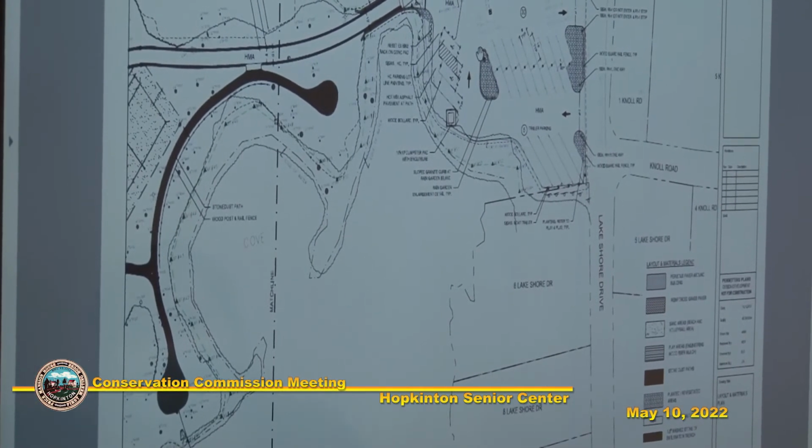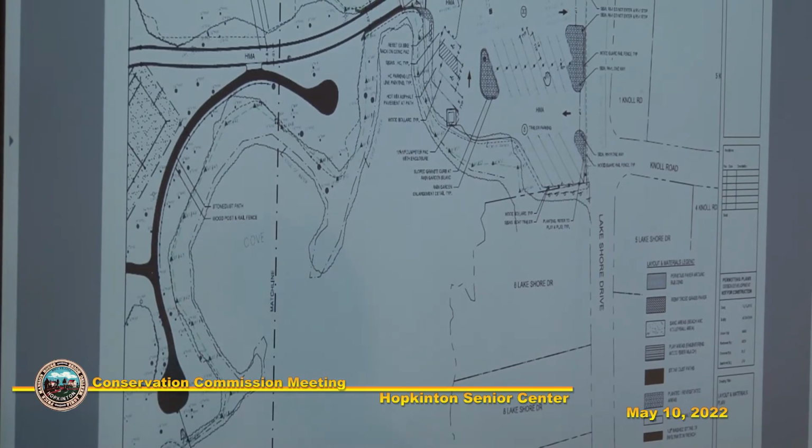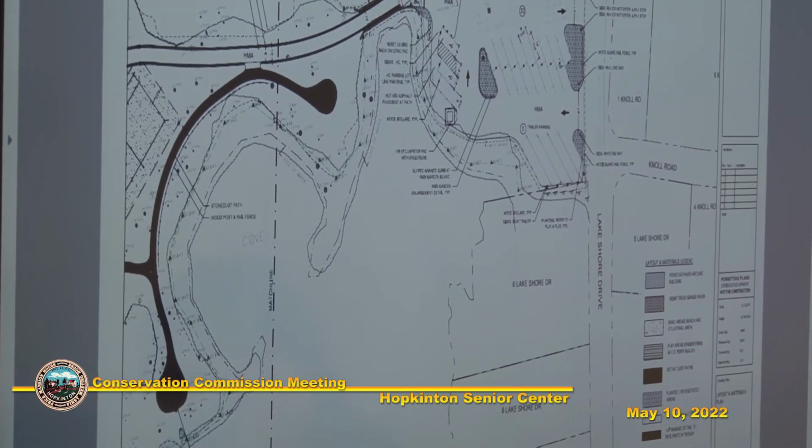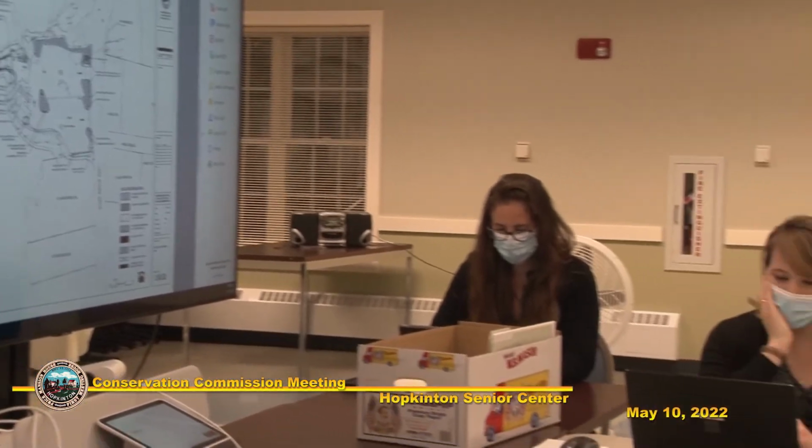Okay. Can I add something? Jay mentioned that there were some decisions made along the way that can't necessarily be confirmed by who made the decisions. In any event, there was no project change request ever submitted for this project. Something like the wall not disturbing, it was decided by someone not to proceed with the replication, probably because the replication areas would have been substantially disturbed in order to put them in, and it's all grown in, it's all natural now. There were no project change requests submitted, and there was never an extension of the order of conditions requested, although the project appears to have been completed within the time frame of the order of conditions. That is, sometime in 2014 it was completed. And I think the order would have expired in 2015.